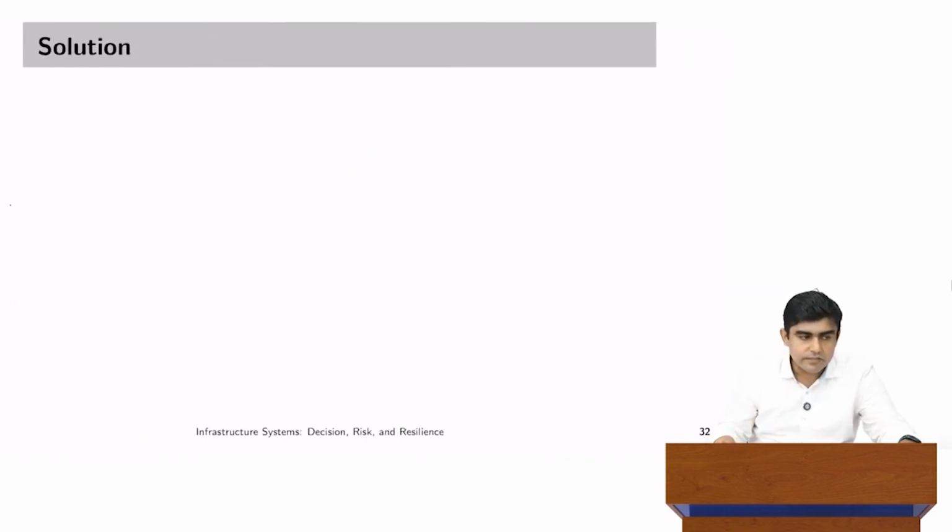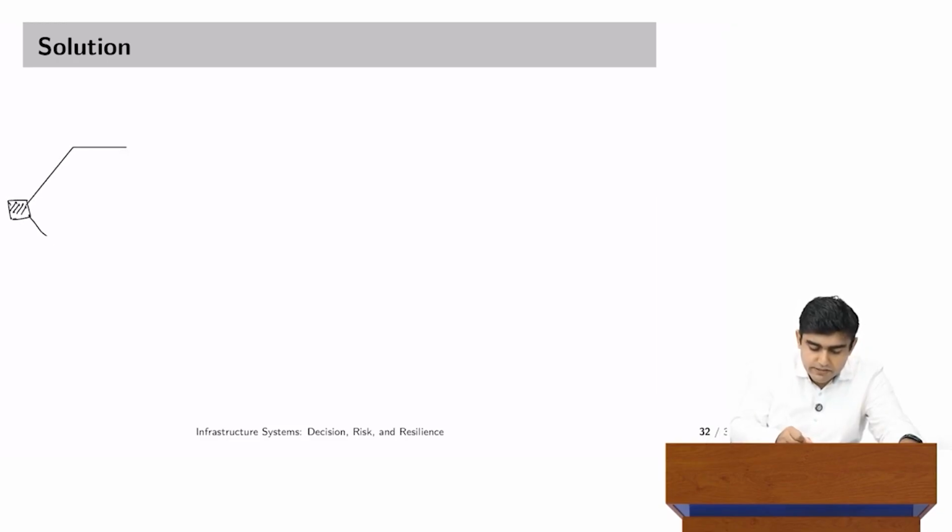Now let us convert this into decision tree as we have been doing earlier. That is, there is going to be a decision node. Out of this particular decision node, there are two decisions that contractor can take. If you see carefully, I have drawn a square box from where decisions are originating, with crash and without crash. Now after this, there is a chance node.